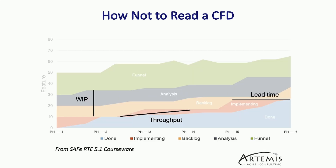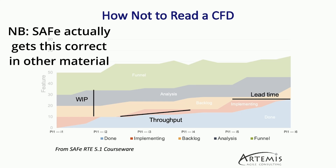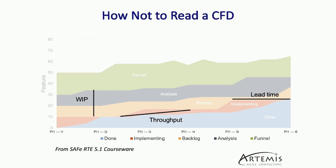This is an example of how not to read a CFD. This is actually from the Scaled Agile Framework RTE class, showing the program Kanban for an Agile Release Train or a team of teams. What they're trying to show here is work in progress on the left, yet it doesn't include the implementing stage. They're showing throughput and then lead time — which actually is not lead time, it's cycle time. Lead time is the time it takes from an item coming into our backlog, i.e., requested by the customer, until we deliver it. Cycle time is the amount of time we work on an item. Be cautious — there are some bad representations out there of what CFDs will tell you.